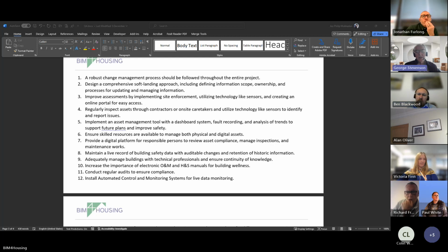But updating the location, for example, of where the designer would put ductwork dampers, and also fire stopping and things like that, will invariably change, because the trade contractor will have slightly different products or slightly different routes.